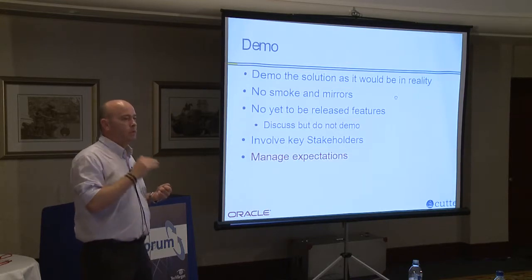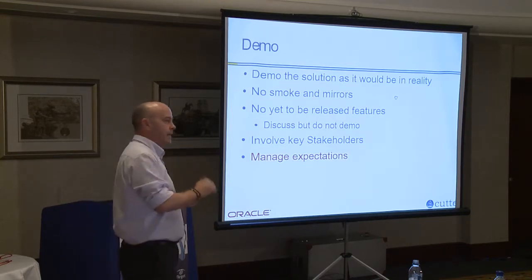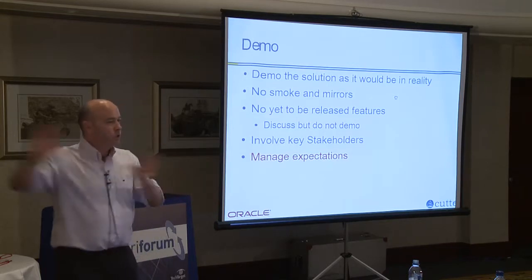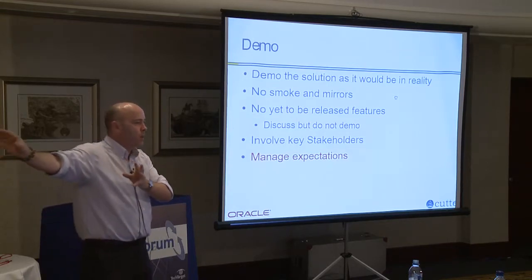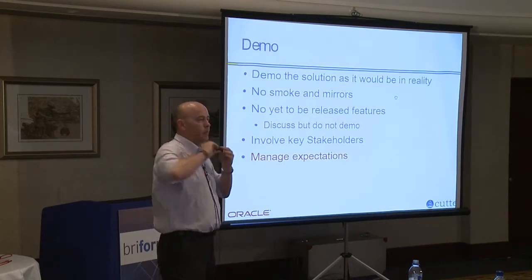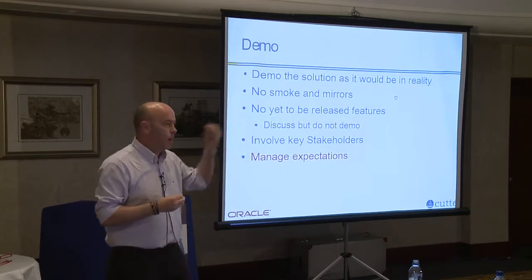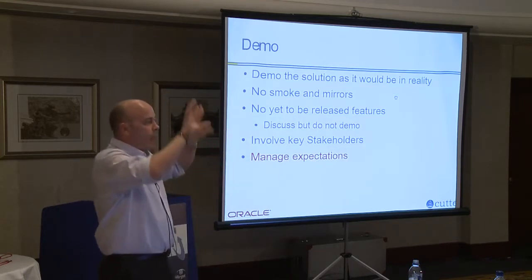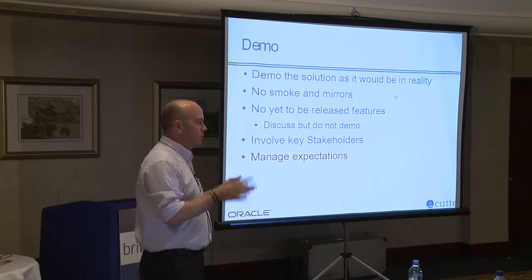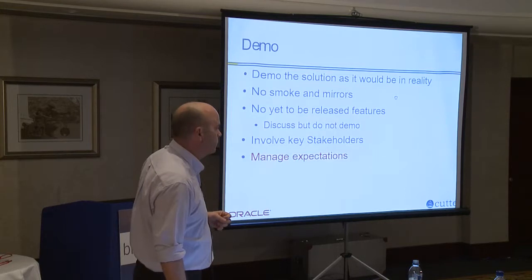There is a fundamental change in the way your desktop computing will be delivered. Therefore, that needs to be engaged with all levels that will be touched and affected by this. And there are soft things outside that as well, like HR departments. They'll be affected by the moves around here, because the nature of the working environment may change, more people working from home, etc. So where I say it's an infrastructure project, it's also an entire organisation project. Everybody will be affected by large-scale desktop change, a move to VDI from fat client PCs.